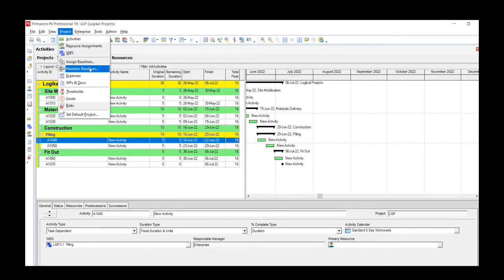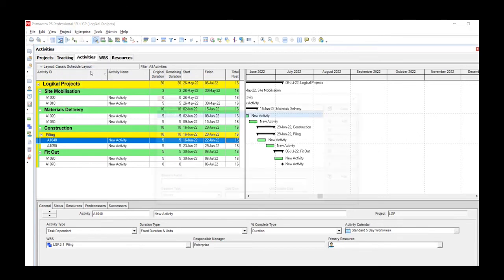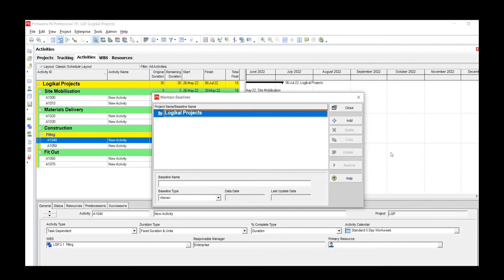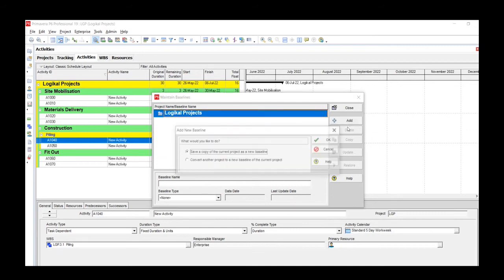We're going to be clicking on the fifth option which says Maintain Baselines. This brings up the baseline window, and then you simply click the Add button on the right hand side.